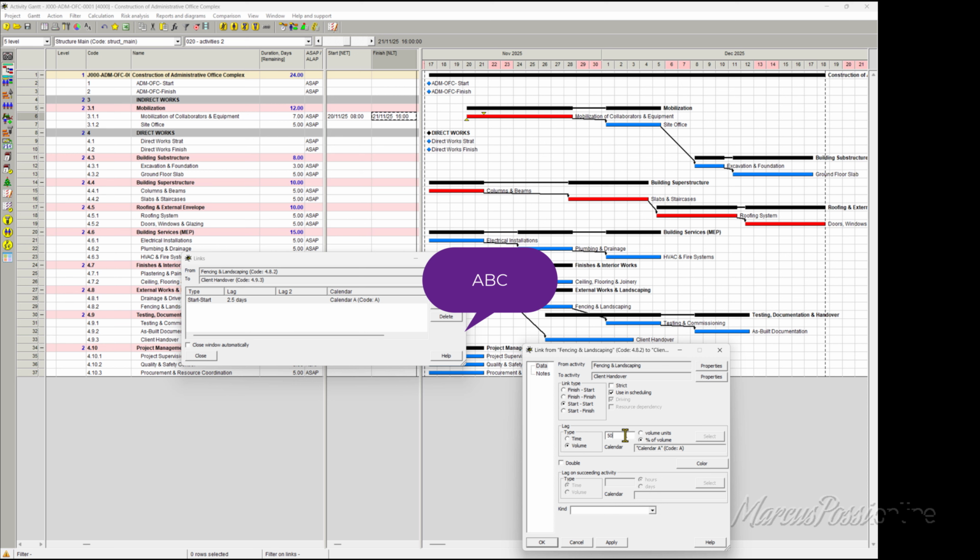I will start fixing my new floor, and when I reach 50%, not the time, because time is relative. I may be very productive in the first part, but when I have 50% of my 100 square meters, I will start my second activity.